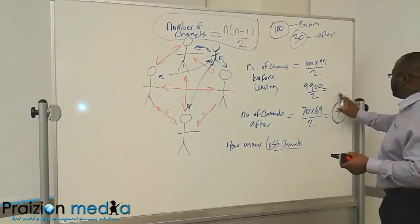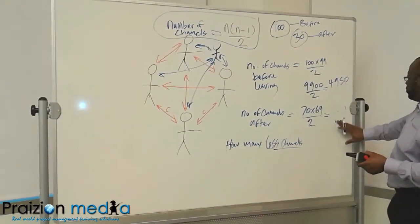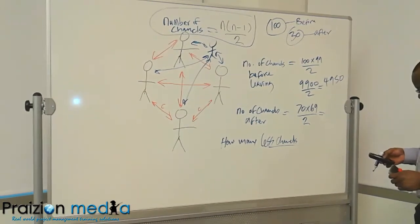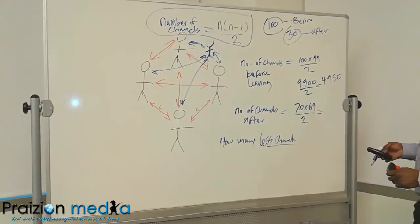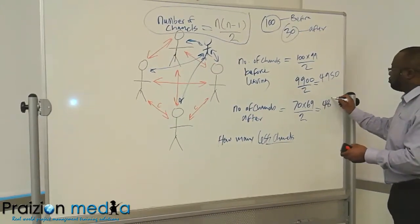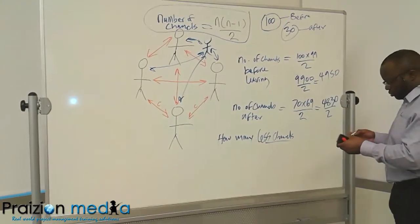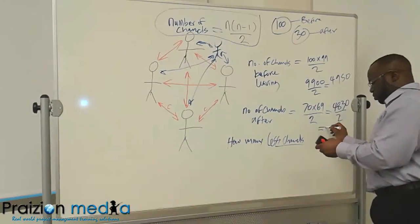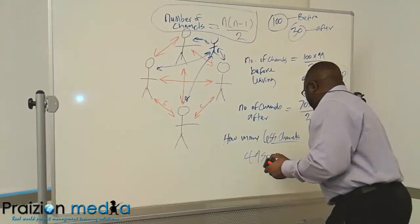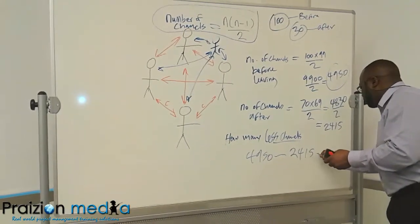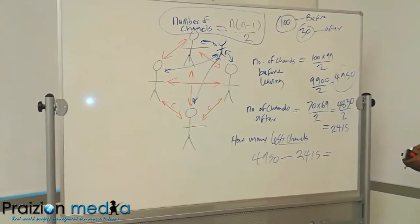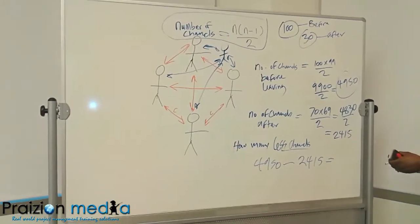So 4,950 is what we have here. What we have here is 70 times 69 over 2, which is 4,830 divided by 2, and that gives 2,415. So we have 4,950 minus 2,415, which equals 2,535.